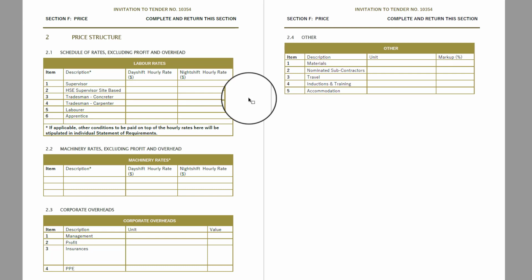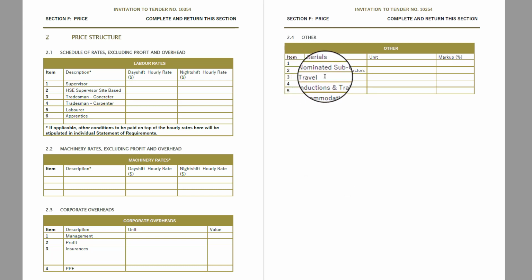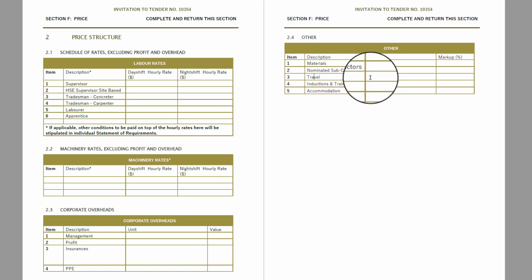If you think there's a better way of pricing it, you can then add some alternate pricing. You may want to give them a whole of business discount or early payment discounts. You might want to say, well, this bit that you've specified here, let's say travel. Travel is, in our case, there's no travel, so it's free. So tell them the bits that you value add for you, don't stay silent on them. Put them in and give them a 0 value so they can see what else they're getting for free.